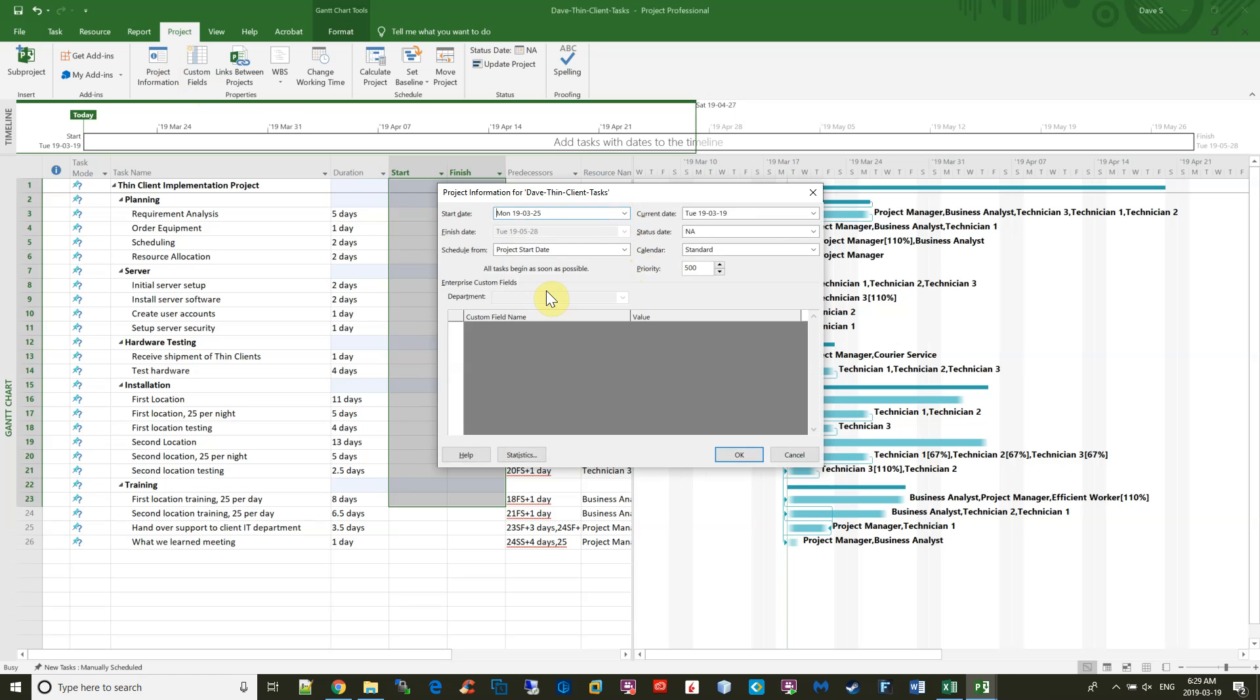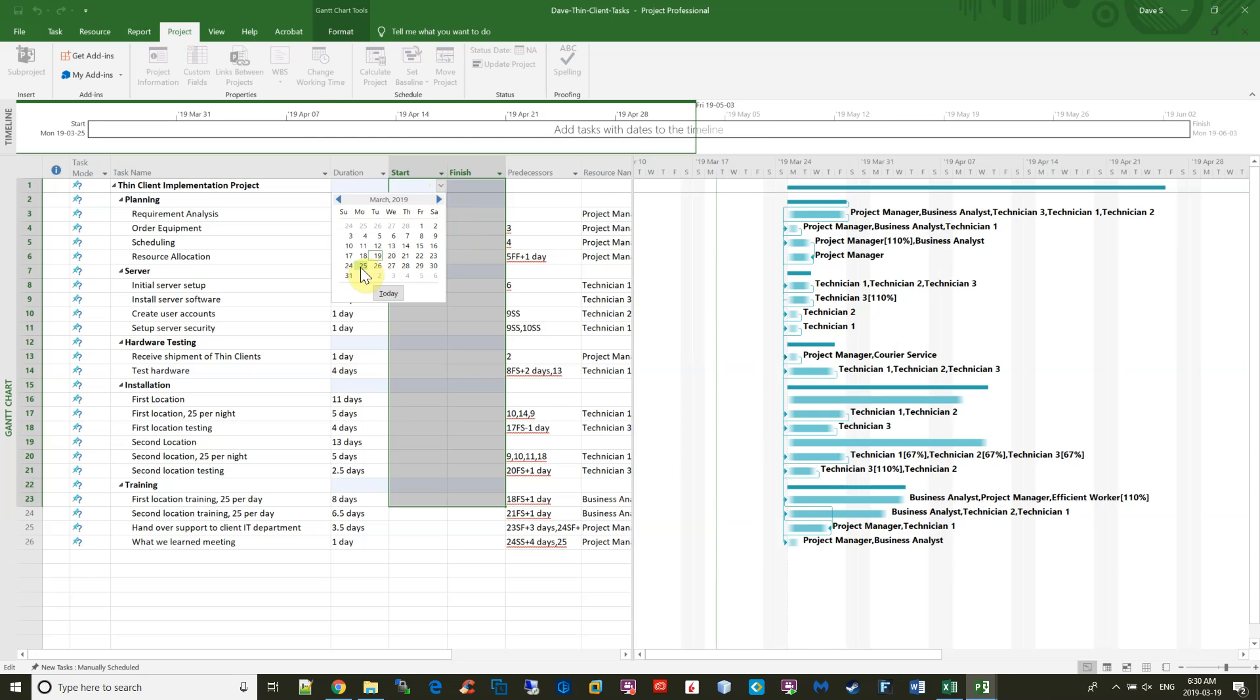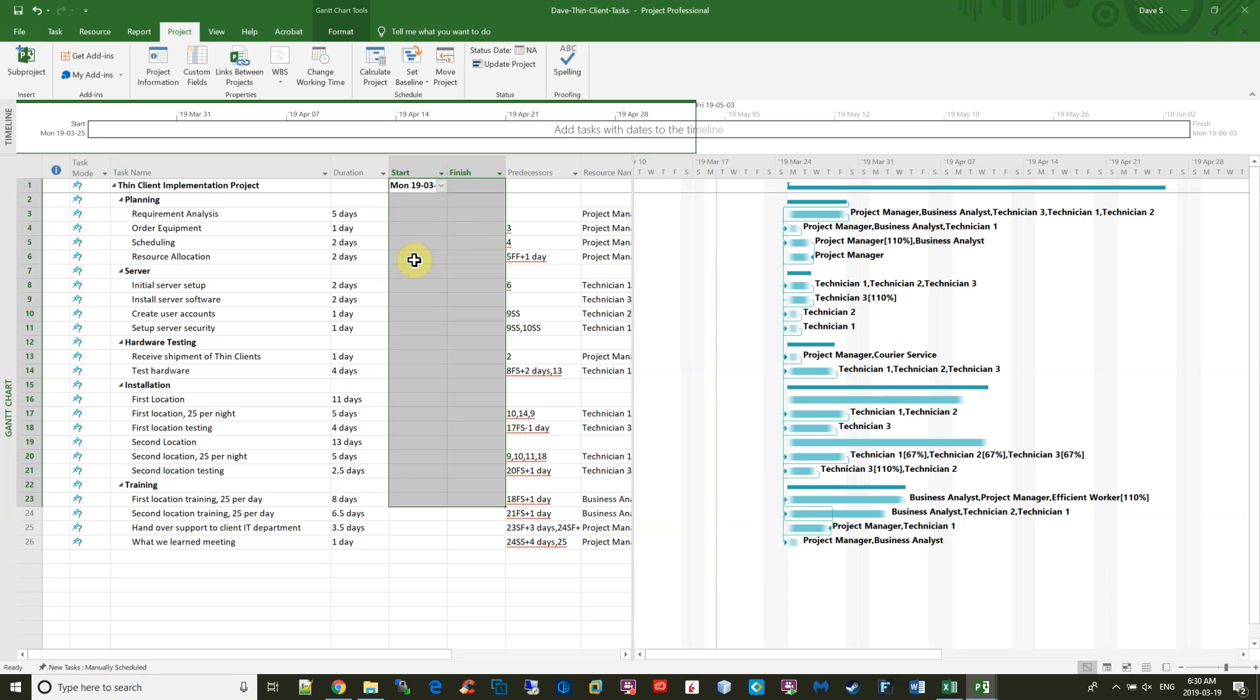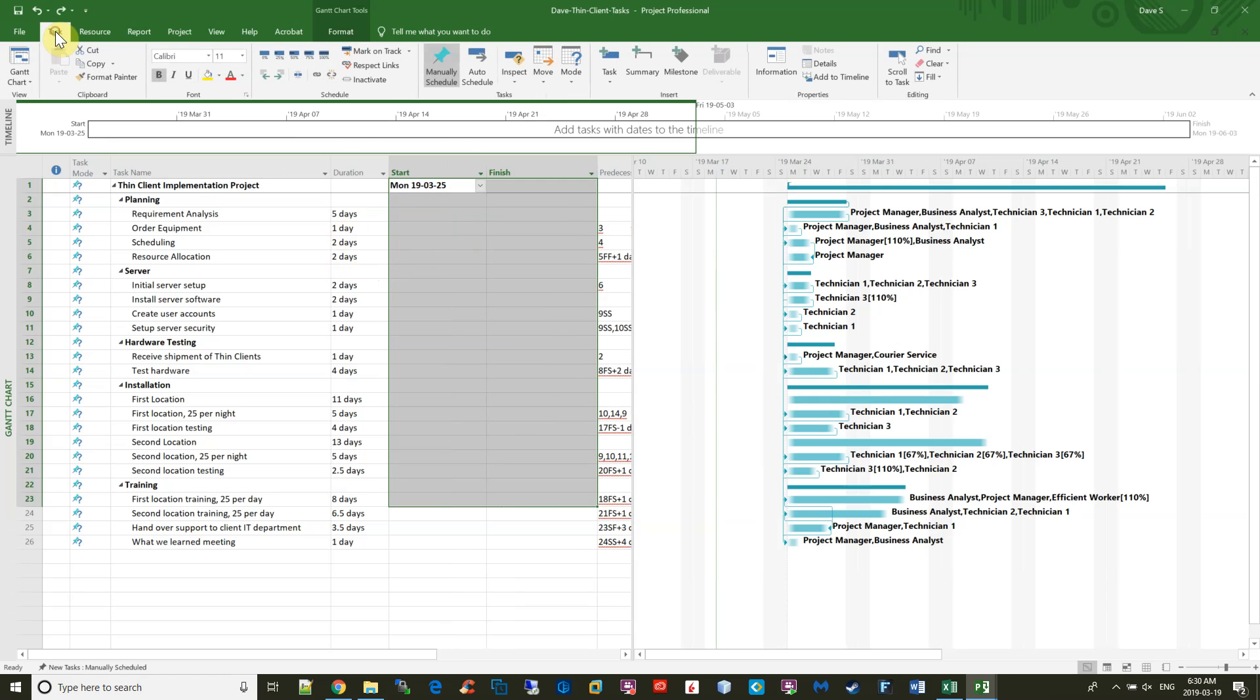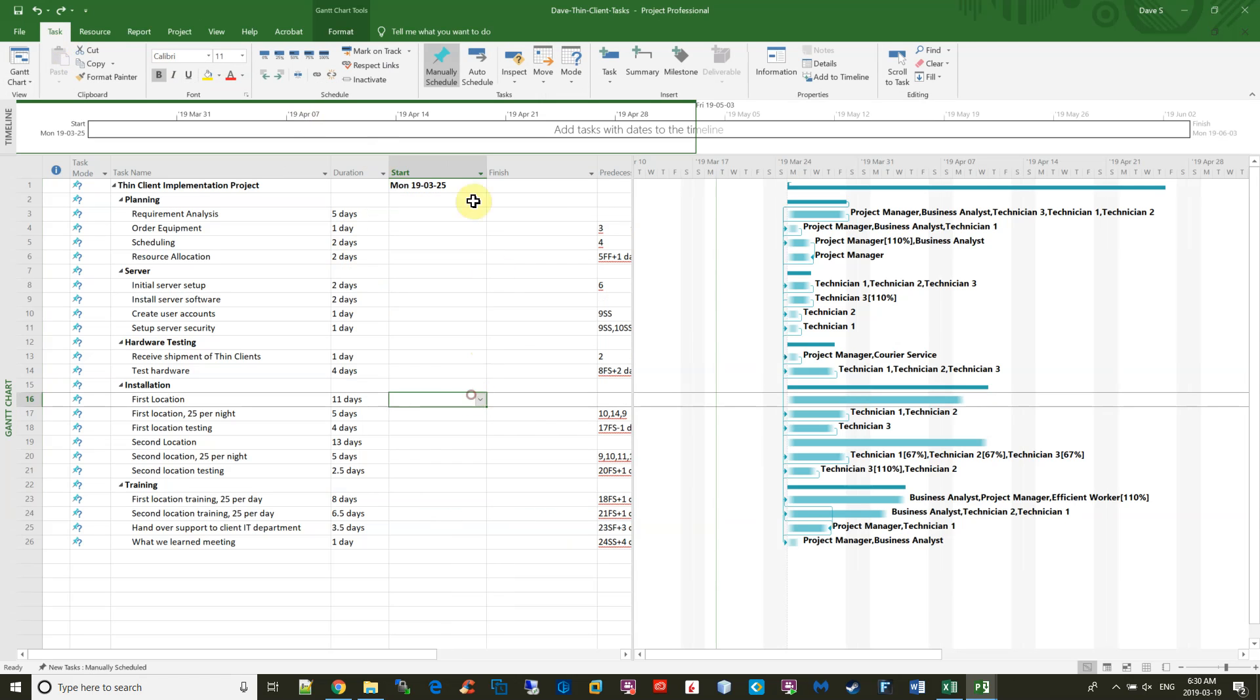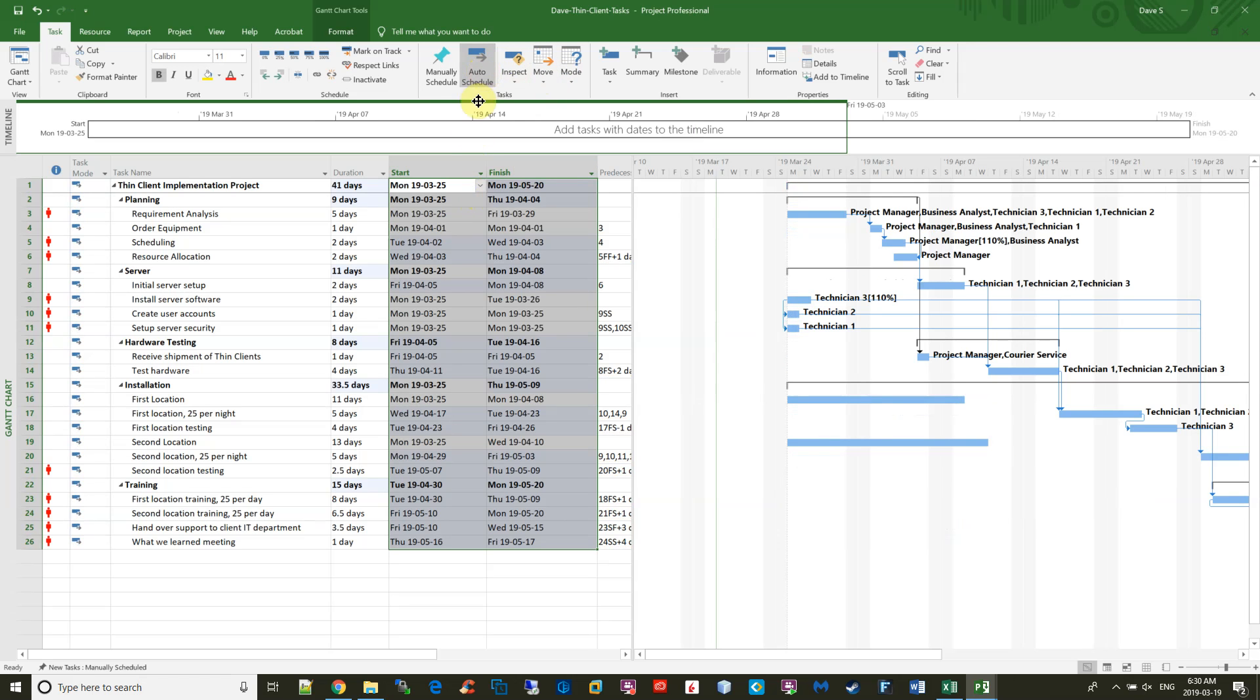So I get a fresh day to start the project on, so it's best if you fill this in first. Then I can choose the exact same date right here. Now I'm going to go to the Tasks tab, and over here I'm going to highlight all of this again, and I'm going to push Auto Schedule.